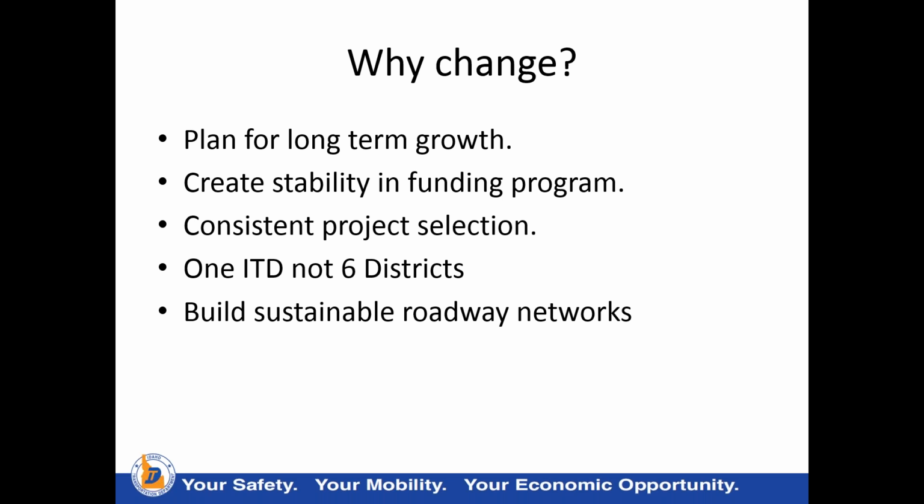We need to create more stability in our project prioritization and funding programs by increasing our time horizon from 5 years to a 10-year planning horizon. In the face of funding uncertainties that we all contend with, we need to understand the implications of projects on the basis of a statewide priority, not based on individual districts. We need to better understand and evaluate the treatments that we choose across the life cycle of the pavement, not just across the individual project. That is to say, don't just paint the road black. Do the right treatment at the right time for the long run.